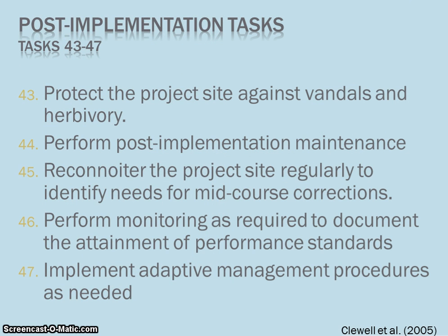Step 5, post-implementation tasks, include maintenance and checkups. Any protections needed, for example, overgrazing by deer or off-road vehicle use, should be prevented. The restoration site should be surveyed regularly, especially in the first year after project implementation. Monitoring, assessment, and adaptive management steps should be implemented as needed.